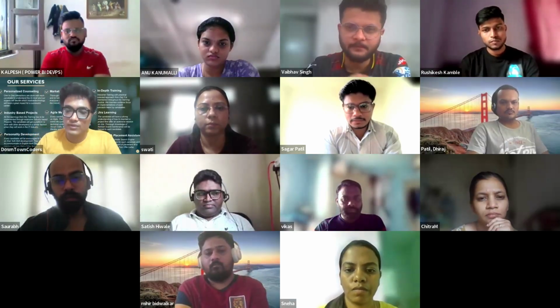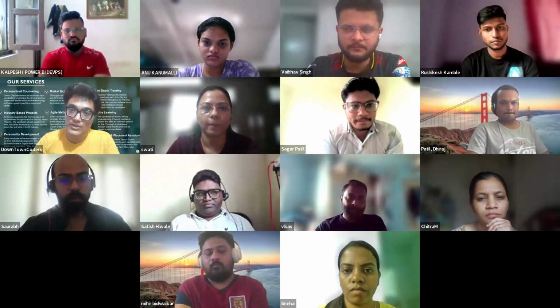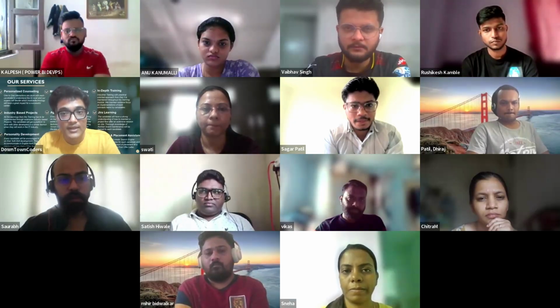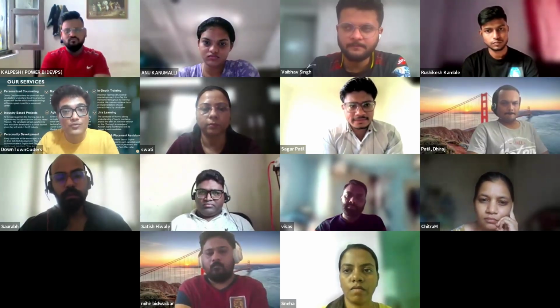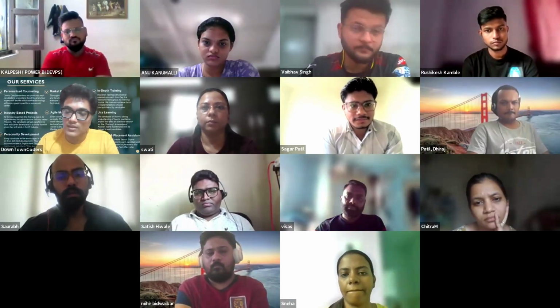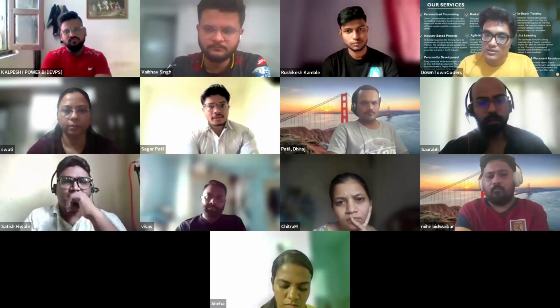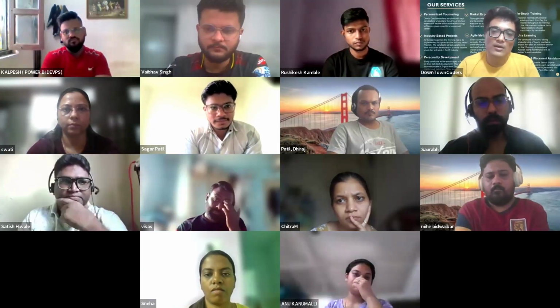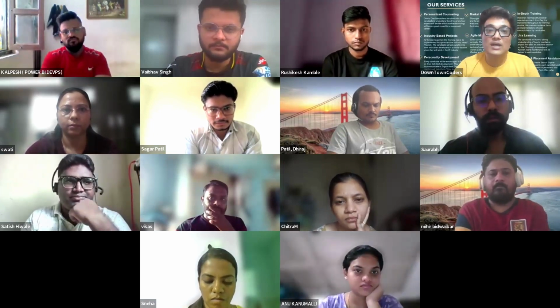So now in these 2 weeks, you will be constantly giving updates on a daily basis. This is how I have progressed. These are the developments that are completed. And at the end of that sprint, after 2 weeks of time, those 4 dashboards should be ready. That means you should get approvals from the client. So there are different phases called development, QA, UAT. This comes under the UAT phase, user acceptance testing, when the user will come and let you know that, boss, my job is done, your dashboard is looking good, and you can publish the work to production. So in this sprint, you have got the approval.